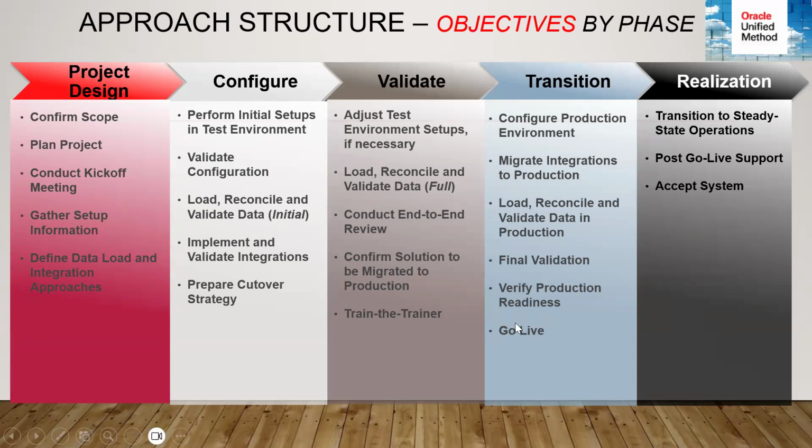So once it has gone live with all the information loaded, then we'll have hypercare activities for 1 month. That will be post go live support. So this is how all the implementations happen across Oracle Cloud.